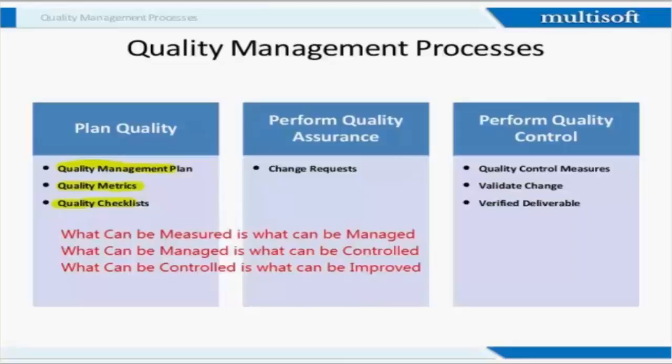We had a huge repository of past projects and their defects. Based on that repository there was a checklist available, and we kept adding more checkpoints to ensure that defects that had been identified earlier don't occur again. So this checklist also gets planned in quality planning.